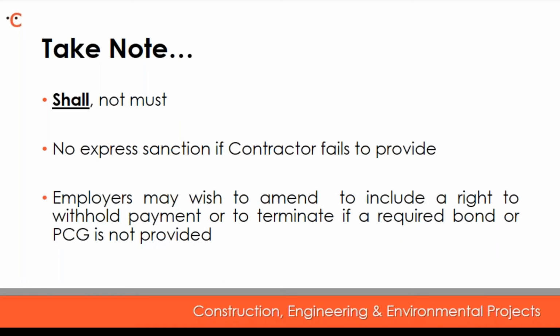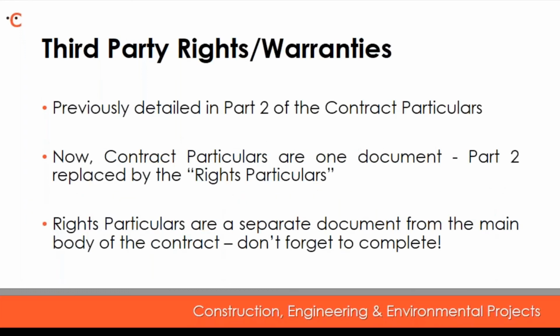That probably won't be acceptable to employers, and they will likely wish to amend the contract to include some express right to withhold payment, or in extreme circumstances to terminate the contract if a required bond or a parent company guarantee isn't provided within the time stipulated.